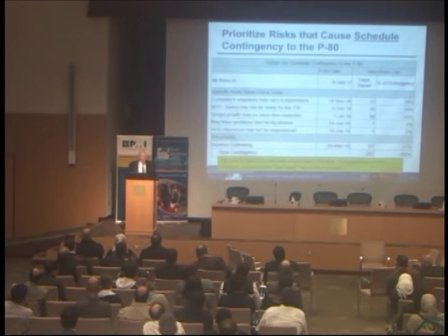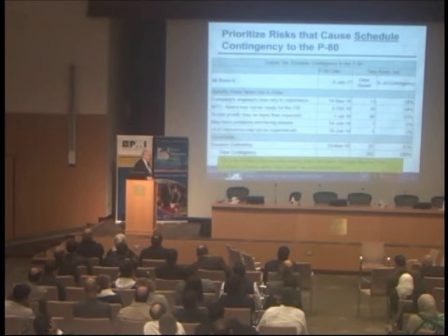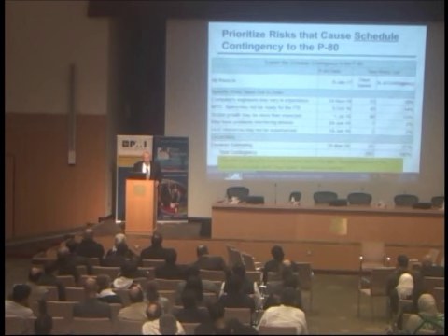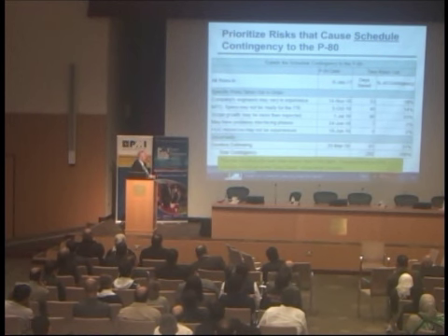Okay? So, in fact, it is not the first one to do. You ought to do them in order, because if you start working on something like scope growth, you're working on the wrong risk. And the other risks are dominating, and so you have very little impact on the final activity. But if you do some good work on mitigating that one, then you work on this one. And if you do good work on mitigating them, and you probably won't completely mitigate them, so the probability probably won't be 0,